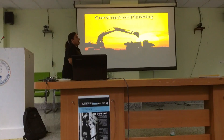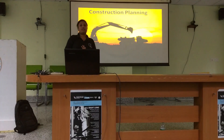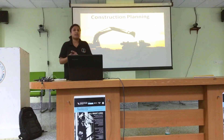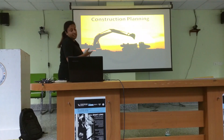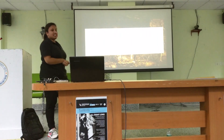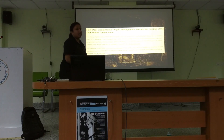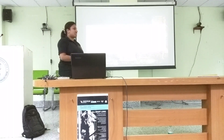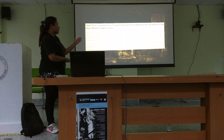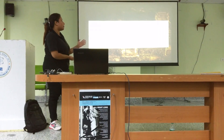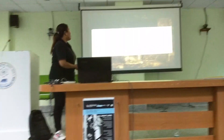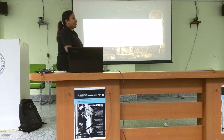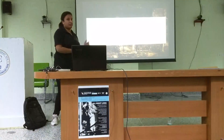Why construction planning? Construction planning is one of the most important aspects in civil engineering because everything in engineering is not about the science — it is about the economics. I can quote an example: the World Trade Center Park station was originally priced at 2 billion dollars and was supposed to be completed in early 2013, but because of some disruption in the supply chain of steel, the project was completed in early 2014 and the cost shot up to 4 billion dollars — double the original cost. Moreover, 2 billion dollars would have been sufficient for making 2 stations in New York City and New Jersey. So if it had been planned properly beforehand, there might not have been such a huge loss.